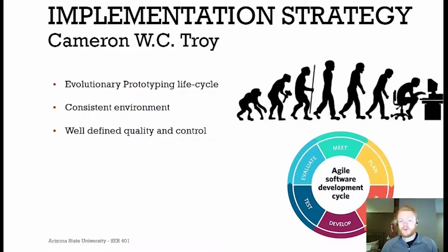It also means we'll be more equipped to help each other when we run into any issues. Quality policies and documentation will be done by Tega, and version control will be done with GitHub. Each user story will be white box tested by the developer responsible for that user story, and then black box tested by at least one other developer before it can be merged back into the master branch. We will continue this iterative process, adding functionality until we have a fully interactive visualization of the Hall effect thruster.